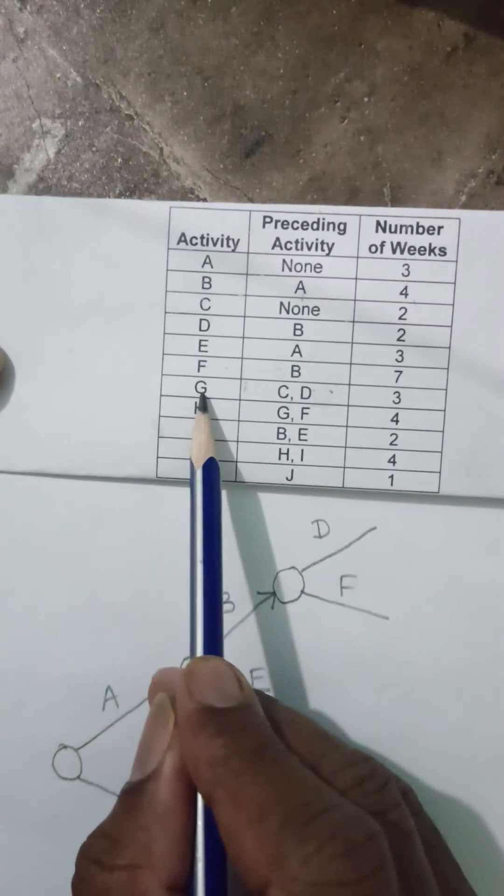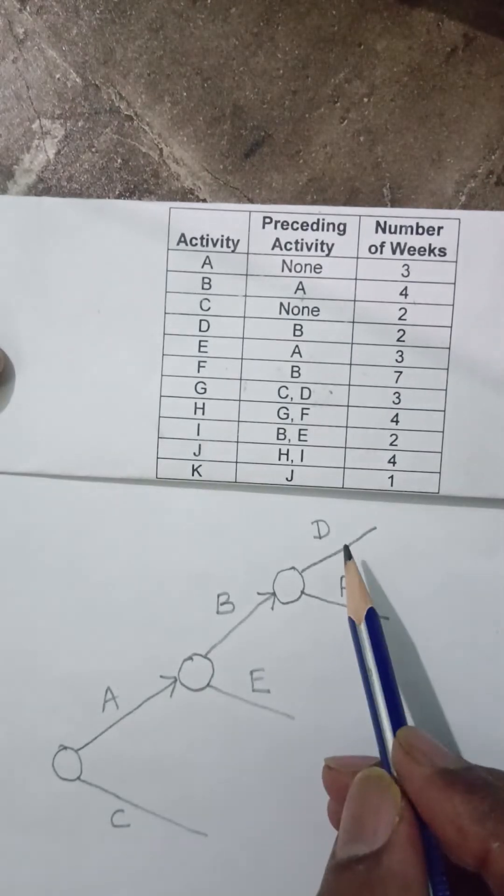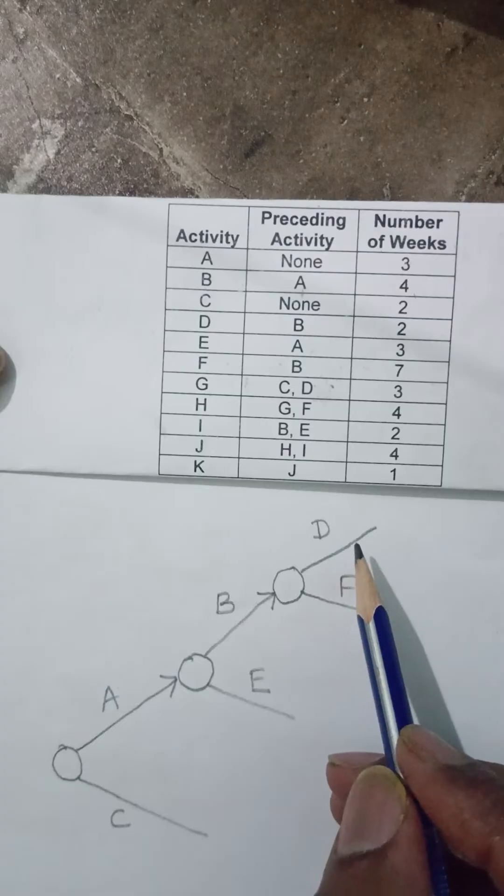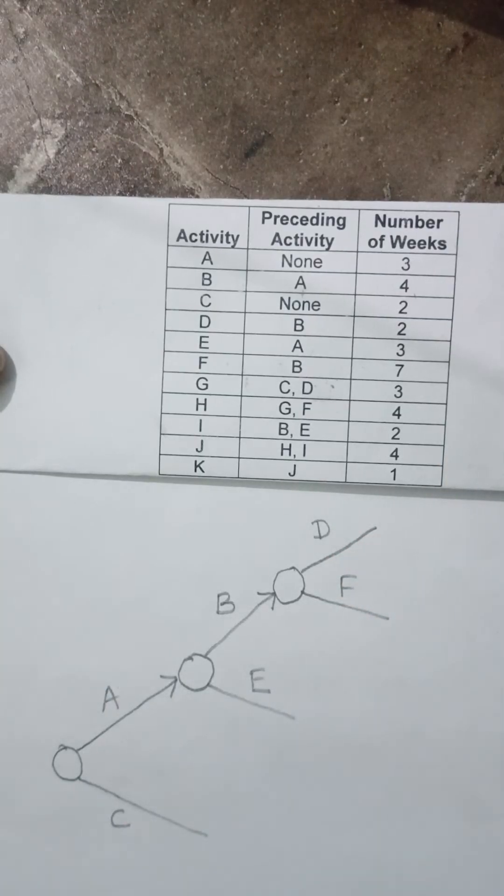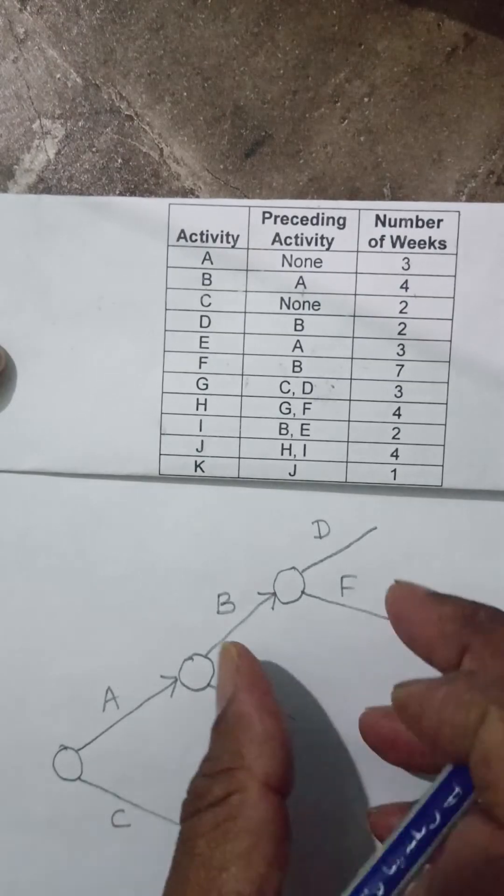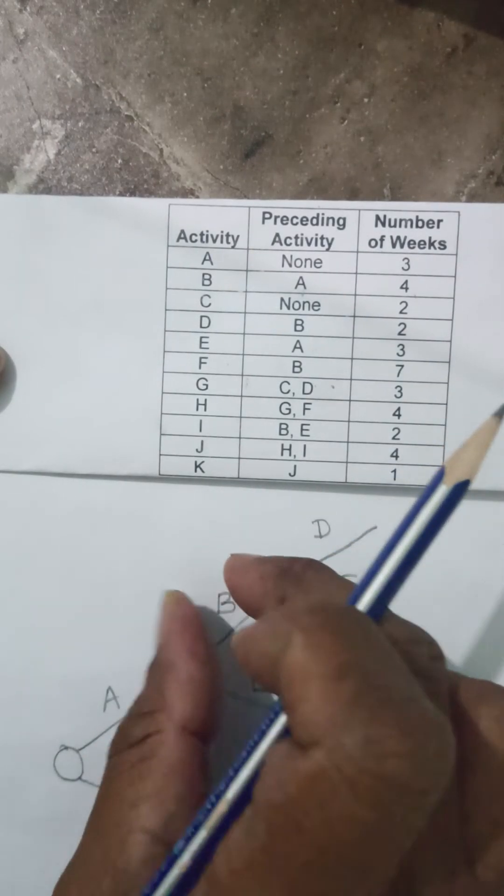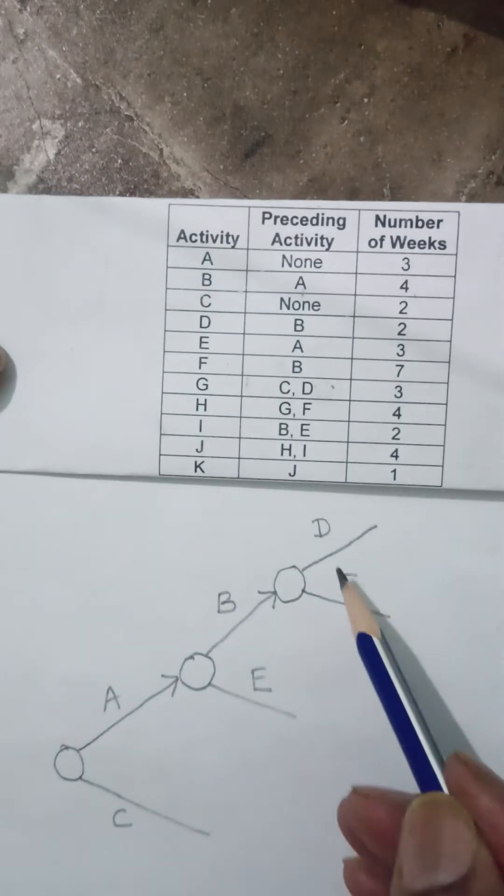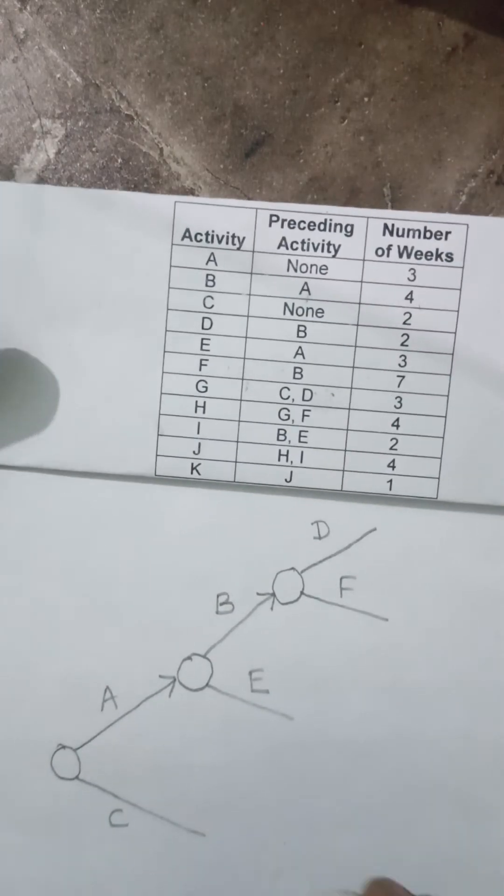Then G activity requires C and D. My C is here and my D is here. Now it is very difficult to bring them together. So what I should have done, I should have brought B down and E up, which will make D down and F up.